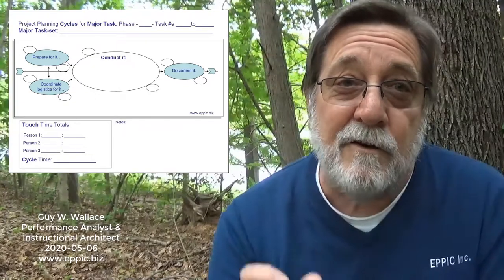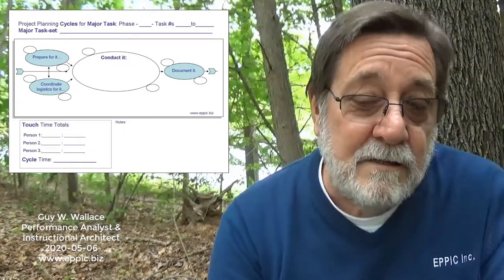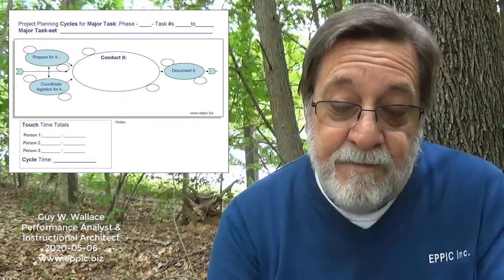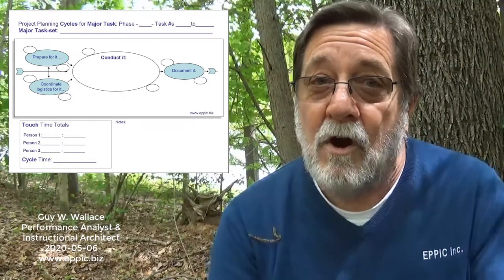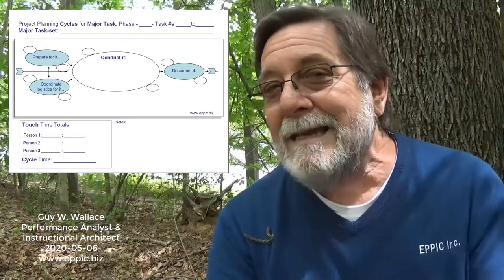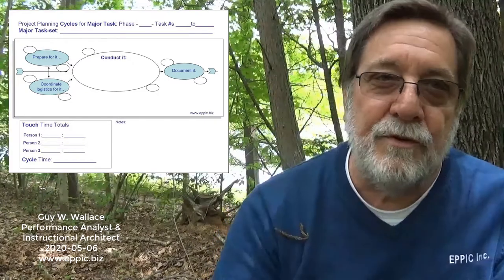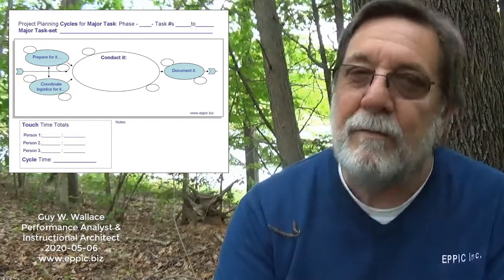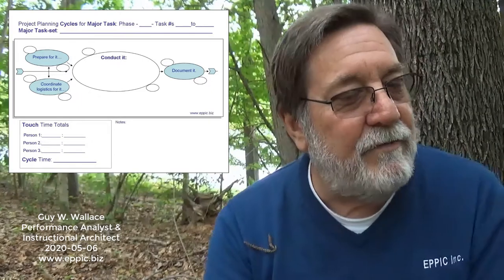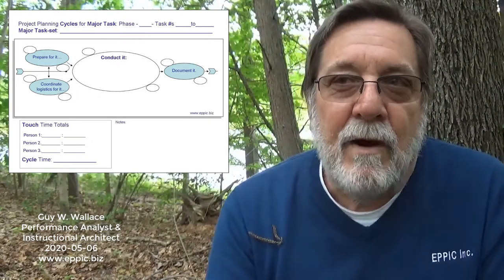Well, there's a little task of preparing for conducting it. There's another task of coordinating the logistics for it, because maybe you have to call up and reserve the room and do all that other stuff. Preparing for it, though, is different than coordinating logistics. I like to segregate those two things out. It's a little bit more detail, one extra level, one mini task, if you will. But that's got to be recognized.